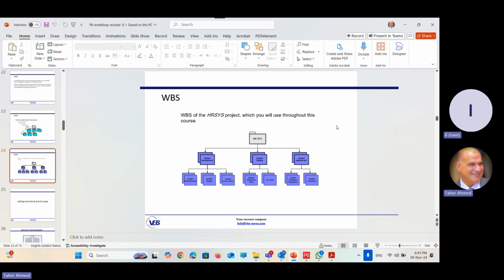Is there any particular way to make this breakdown structure? I represented to you that I used almost the discipline, the type of work, to break down the structure. Maybe the marketing man or woman said, I don't like what you are doing. I'm here to market the product this project will deliver. So what is the technique used? I want to break down the project into residential floors, commercial floors, entertainment area, food court, gates, parking.